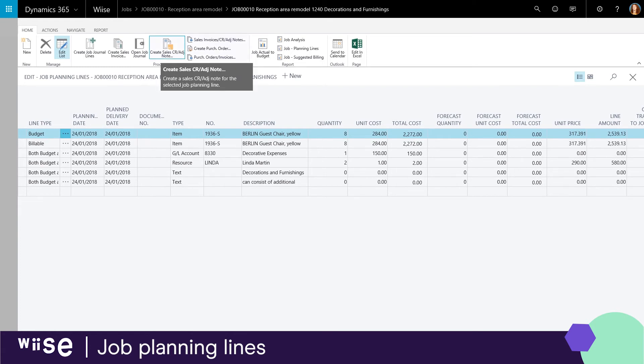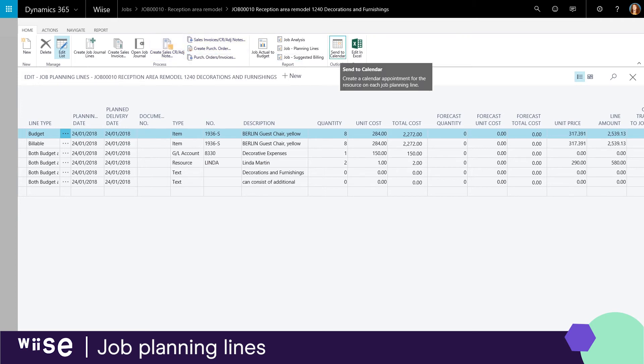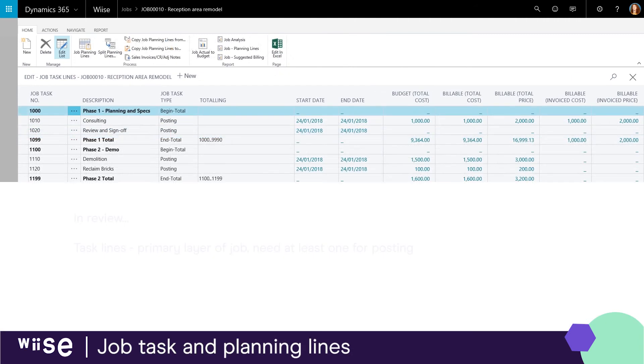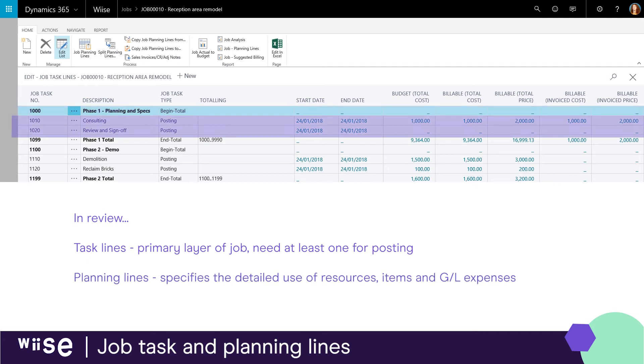Project accounting is fully integrated with sales and purchases in WISE. From the planning lines you can create both purchase orders and sales invoices and credit notes. This makes the job task and planning lines the central point to manage project budgets, monitor progress and performance, manage resource and project supplies and utilize invoicing for your jobs.